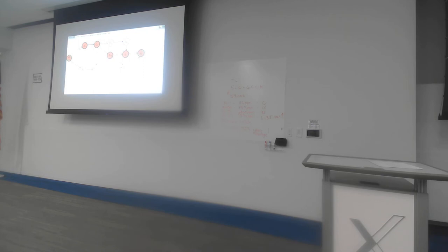And so that complicates things when I want to accelerate a project, because now I have to make sure that I crash both of those paths by one day at the same time. Because, for instance, if I was to crash an activity on one of those paths and not crash an activity on another path, then it wouldn't make any difference, because the other critical path would remain the same. And so therefore, the overall project duration would remain the same as well. And that's not what I'm looking for.